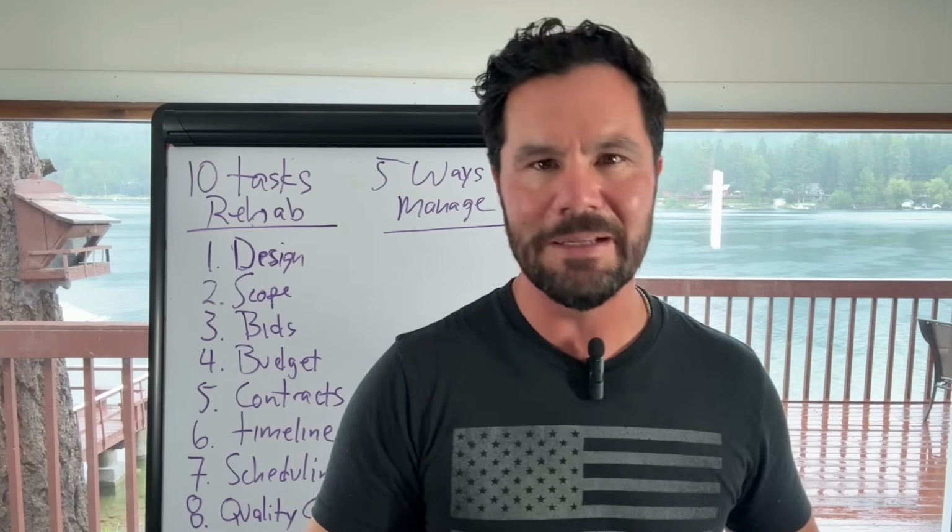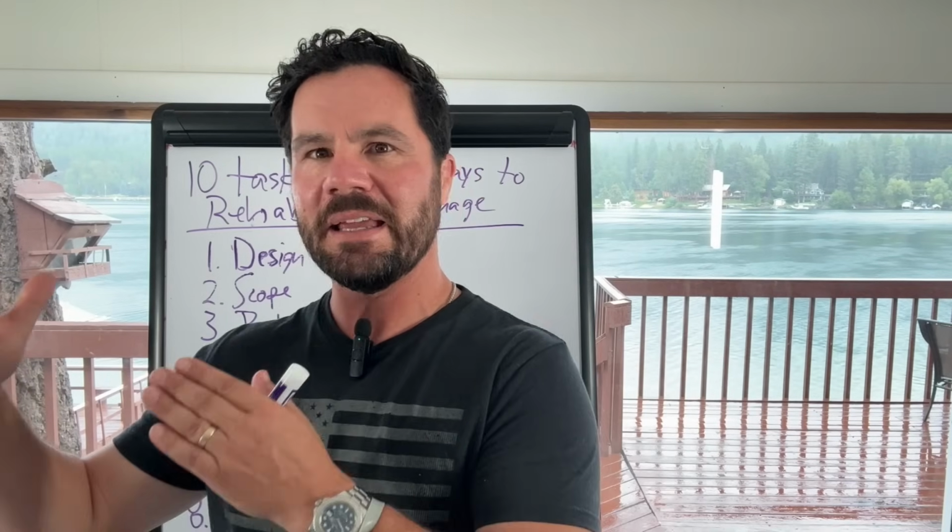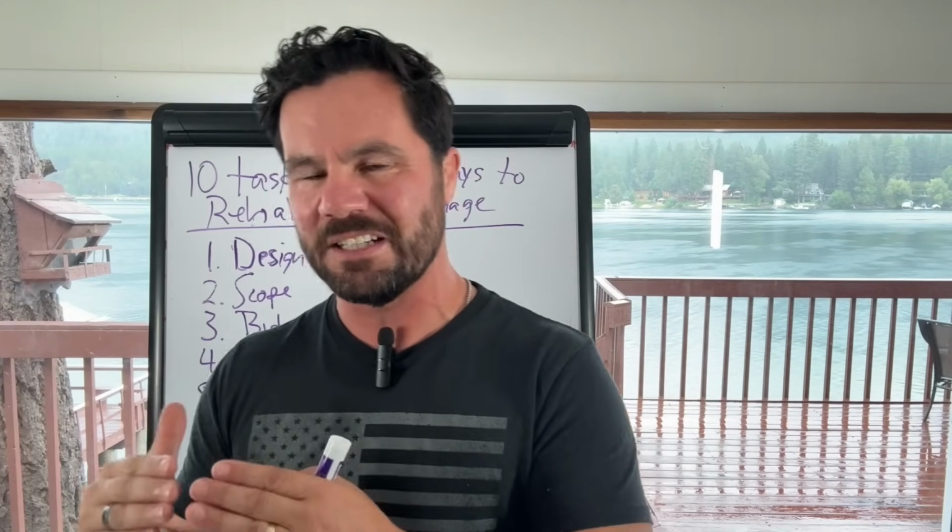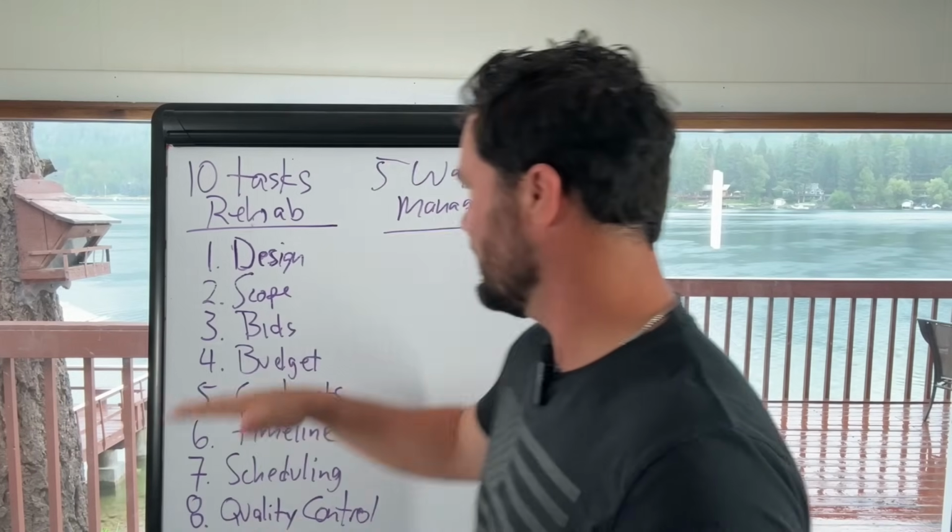Rather, I'd like to bring in 15 different subs. I want a gutter guy that all they do is gutters. I want a tile guy that all he does is tile. I want a painter where all he does is paint. He doesn't also do drywall and landscaping and whatever. So that way I can get very narrowed down, very specific bids based on my scope of work. Okay, so that's getting bids.